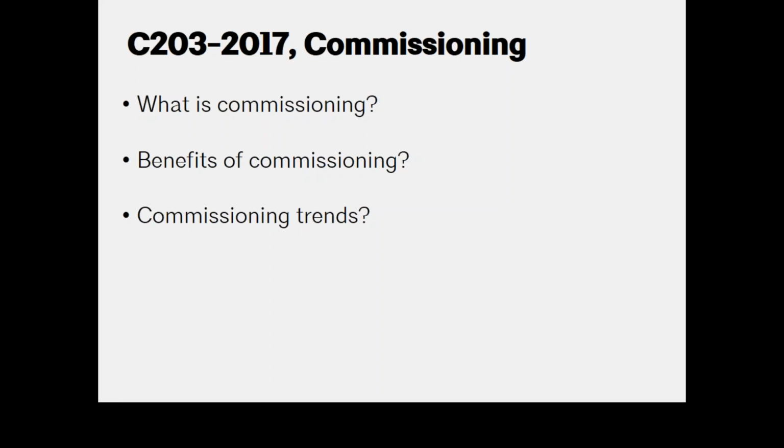Some of the trends that we've seen in commissioning include earlier engagement of the commissioning provider. I think 10 to 15 years ago, it was pretty common for a commissioning provider to come on towards the very end of the project and commission the project at that point. Now, all of the best practices guides and industry practice have suggested that the commissioning provider come on to the project during the design phase and actually review the design at appropriate intervals.